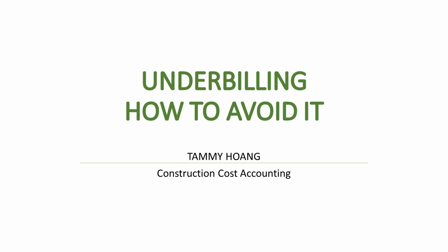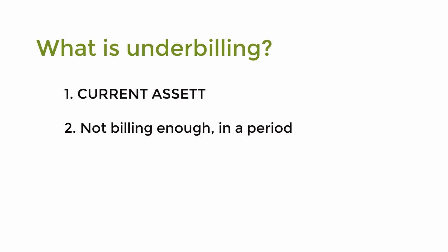Today I'm going to talk about underbilling and how contractors can avoid it. Let's get started. So what is underbilling? Underbilling is our current asset because we have worked so hard on the job, yet we don't bill our client enough. Eventually, we don't collect enough money. We are short in cash. So basically, underbilling is we are not billing enough in a period of time.